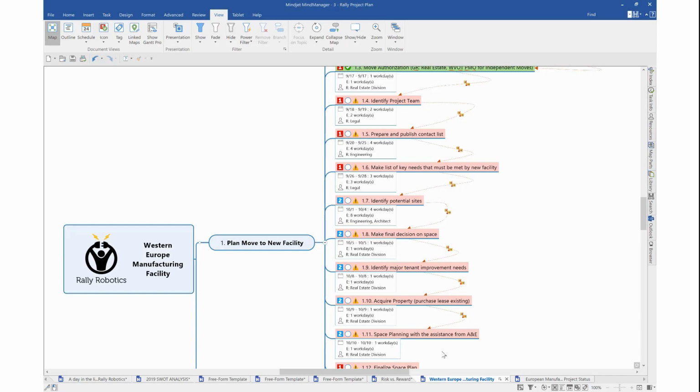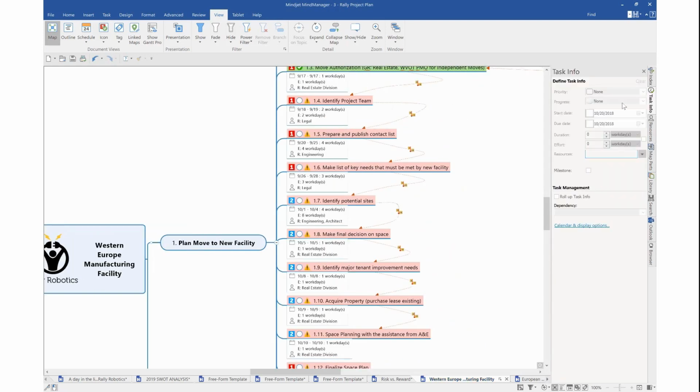Now moving forward, in the example is some updates that we've added to the project planning. In this release, we've enabled effort-based planning. So if I take a topic, I'm going to talk through this really quickly. I'll open up the task information. In this example here, we have one task with one resource that's going to take 2 days, and it calculates as 2 days of effort.